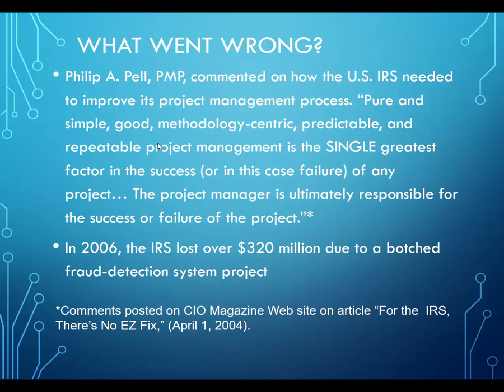According to the background information supplied to the book from Computer World by the IRS, the company promised that a new system would be in place by January of 2006. So in October 2005, the IRS decided that it would use the new system for the 2006 filing season. But the company did not deliver a functional system, and was unable to put the old system back as a contingency plan so they could use it for 2006 instead of the new system.